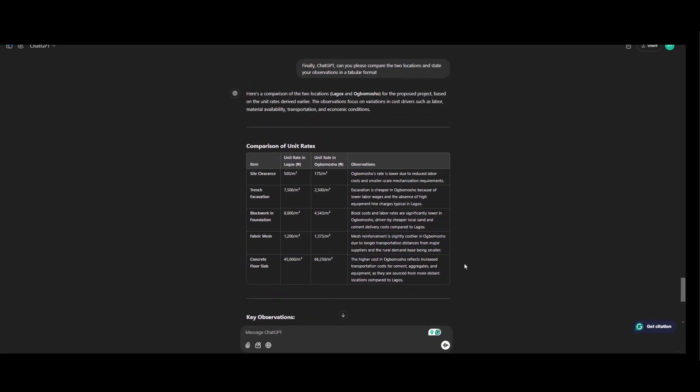Okay so this is what we have at the end of the day. So site clearance in Lagos rate per unit is 500 Naira per meter square. In Ubumosho is 175 per meter square. Trench excavation in Lagos is 7,005 per meter cube and in Ubumosho is 2,005 per meter cube.